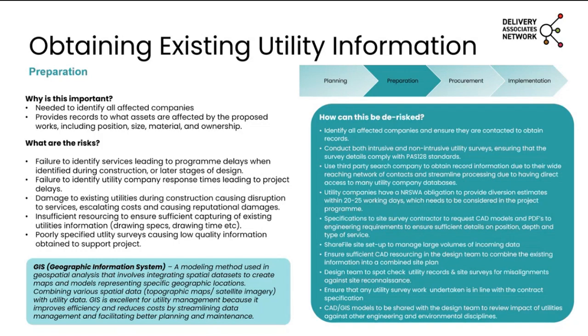There's also talk about how we use GIS from those CAD models. You'll get the raw CAD models, but we've started on a lot of projects using GIS more and more to allow the design to be integrated and to have an overall GIS model of the environmental and engineering design. And by having GIS models, you can demonstrate how the utility designs impact on the overall project. And also you can model these against time as well in the fourth dimension with the use of a GIS model. So getting that sort of thing set up at the start of the project is critical to success and to delivery. Next slide, please, Daryl.